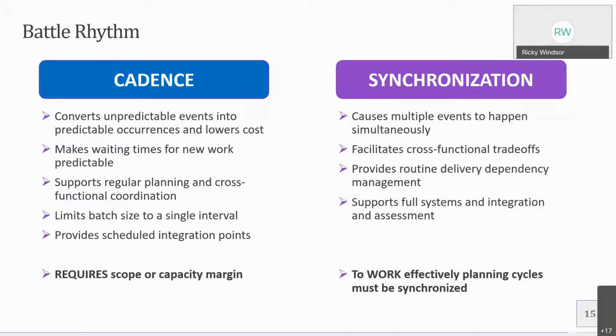It allows waiting times for new work to be more predictable, right? So the job or work in progress is better predictive of how far that capacity can go and how long it will take. That allows you to get the next thing out of the backlog or out of the work to be done bin, if you will, up in the front and accomplish the next task and really build that accomplishment chain, if you will.